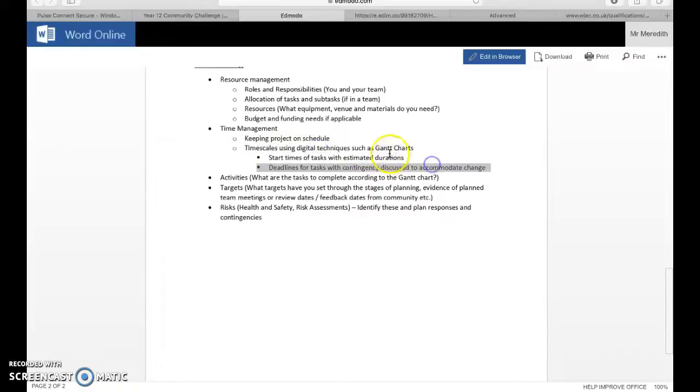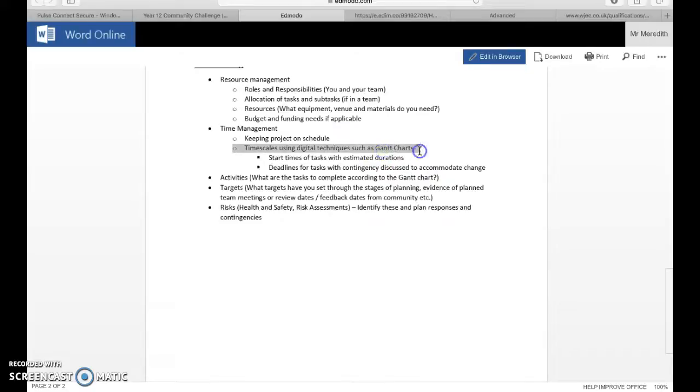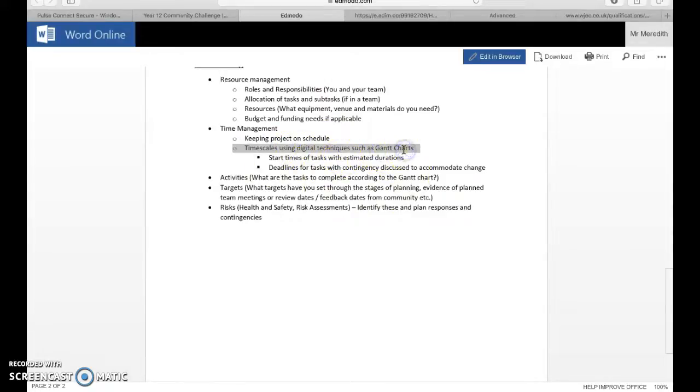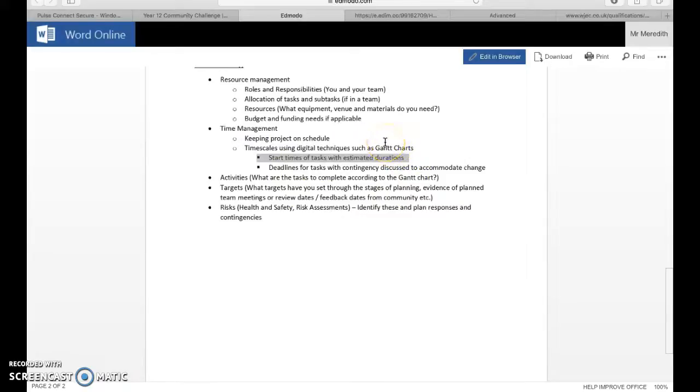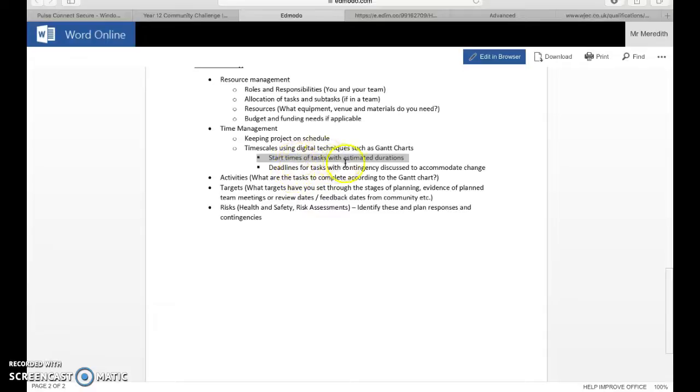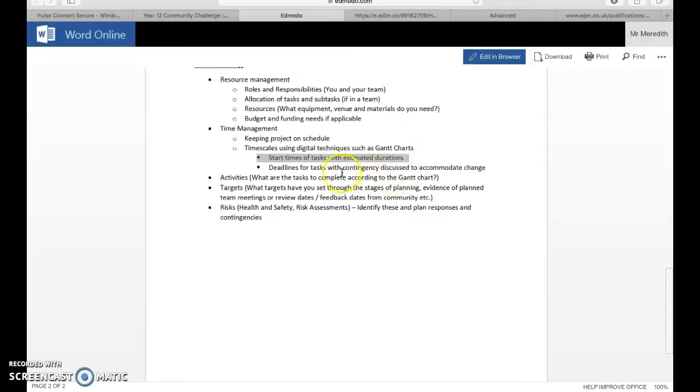Keeping your project on schedule, you could start off with making them to-do lists and by when and transferring them into Gantt charts to get further marks. There is stuff on Edmodo about making Gantt charts. If anybody's really stuck, message me and I'll put something together for you if you are struggling with Gantt charts. There's loads of templates on Edmodo, this video is about describing how to put them together and what they look like. Start times of tasks with estimated durations, estimated, it's not going to flow exactly as you plan, nothing ever does.